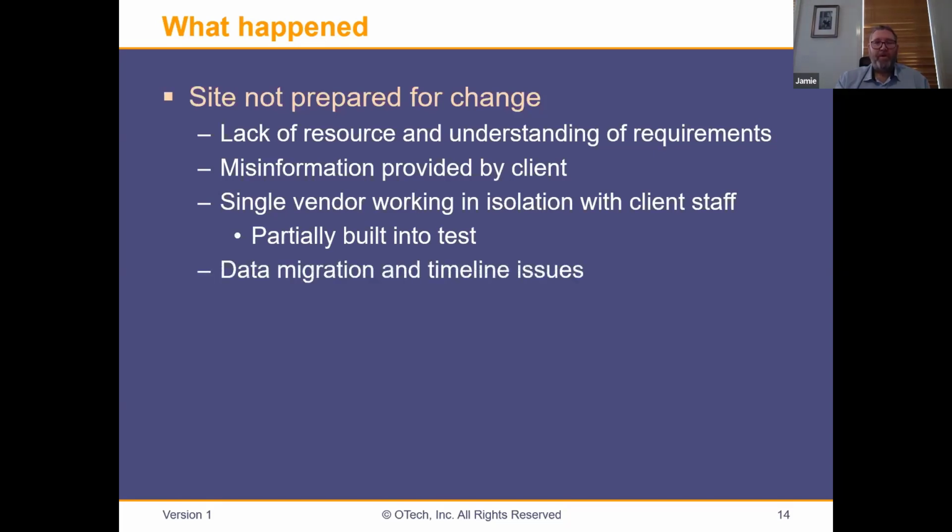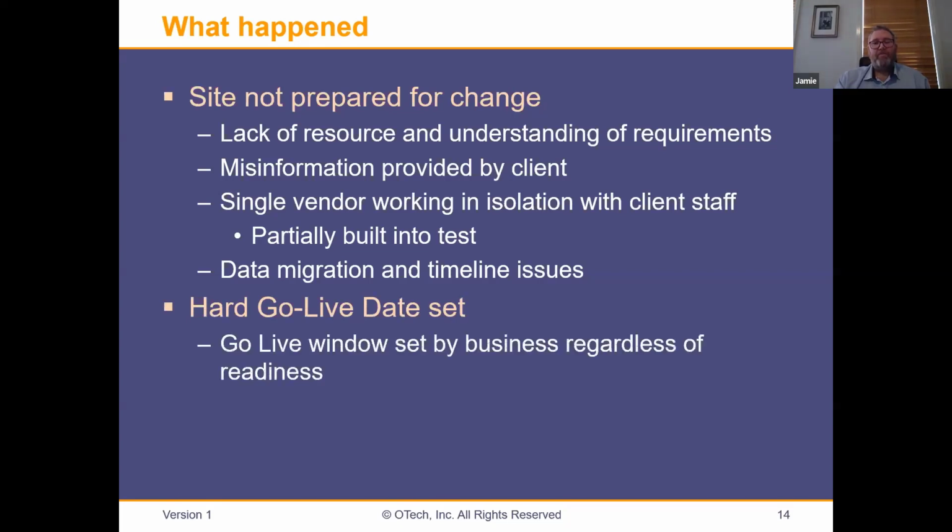Now, wrong, by the way. They actually hadn't done anything on that. There were some data migration components, and they hadn't engaged the incumbent RIS vendor for that, and there were massive timeline issues on getting that done. I went to a meeting, and the business informed me that they were going live with this solution regardless of any of the issues up above. So ready or not, we're opening the doors and we've got a commercial requirement to do so.